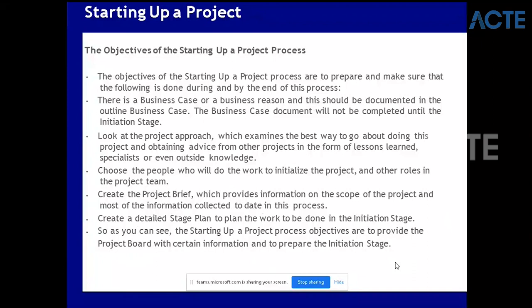Generally what happens is every quarter or every six months there will be a board meeting where all these projects will be discussed. So before that, we do a Starting Up of the Project to put it up for the board. Let's say in a company it happens every January and every August - somewhere around December we'll do starting up the project, create a project brief and business case, and present it to the project board which will happen in January. The project board will look into all planned projects, approve the viable ones, and then they'll start the project.